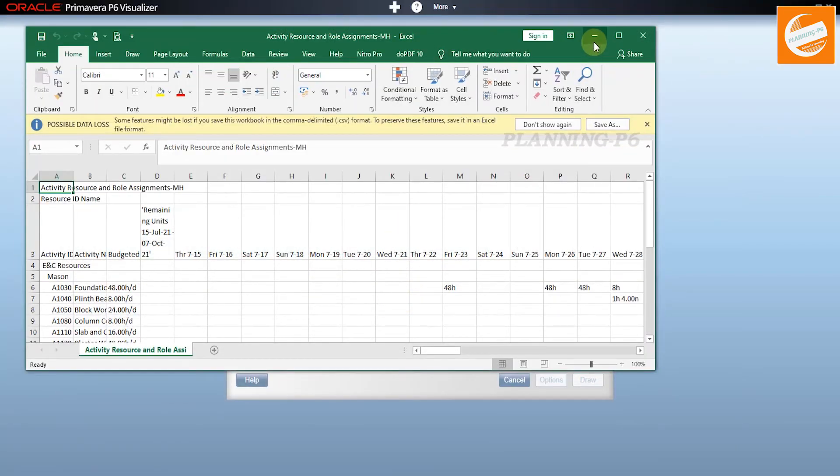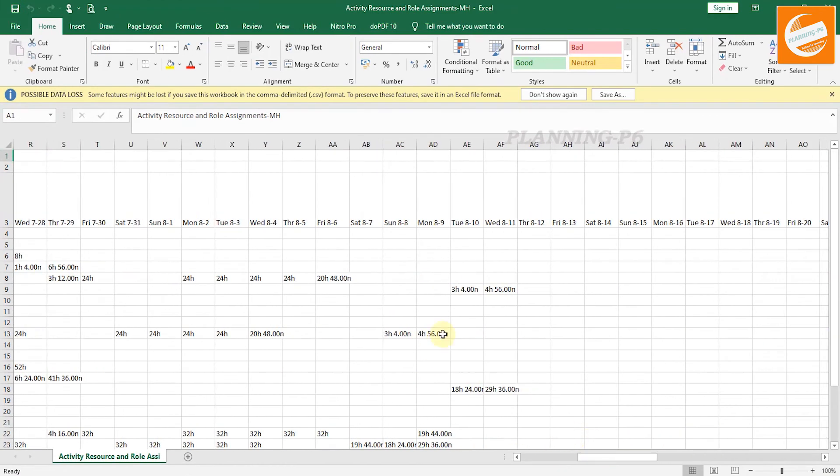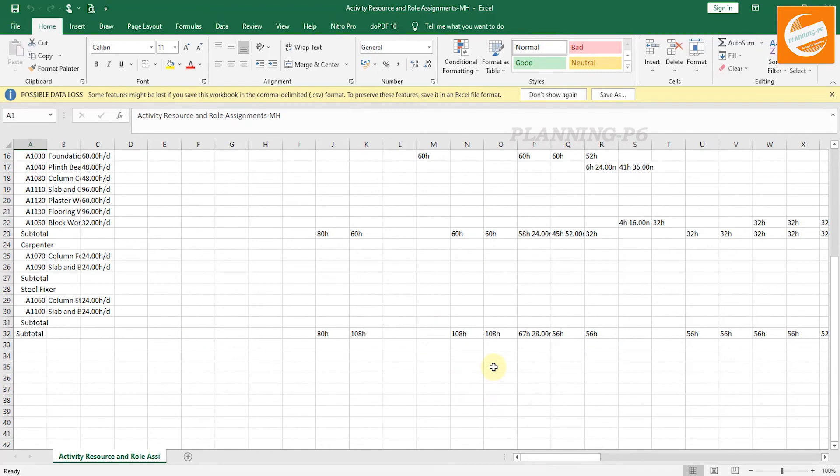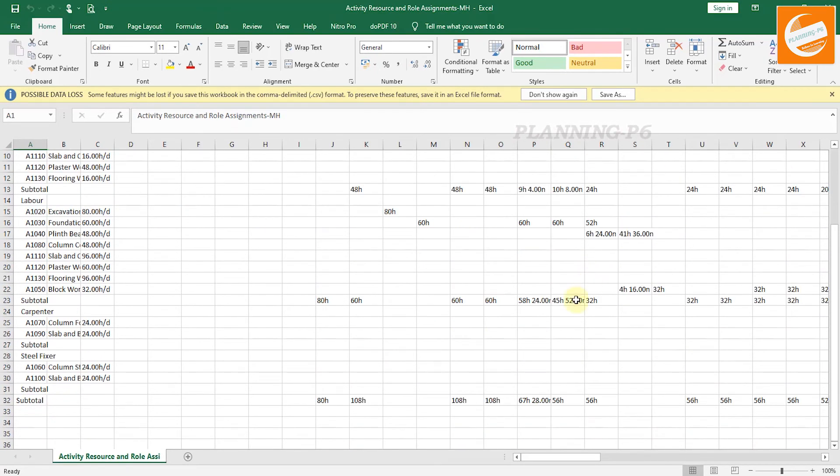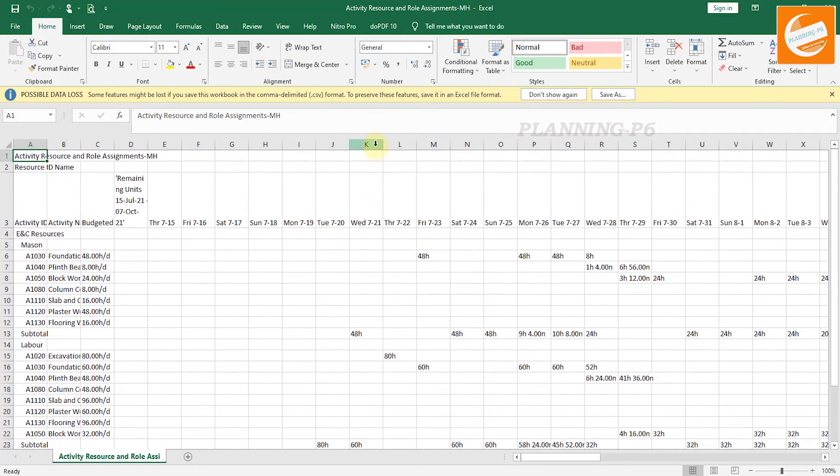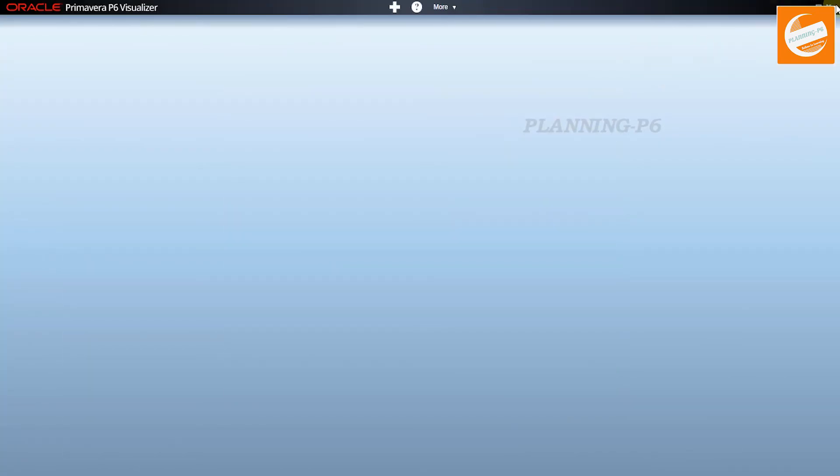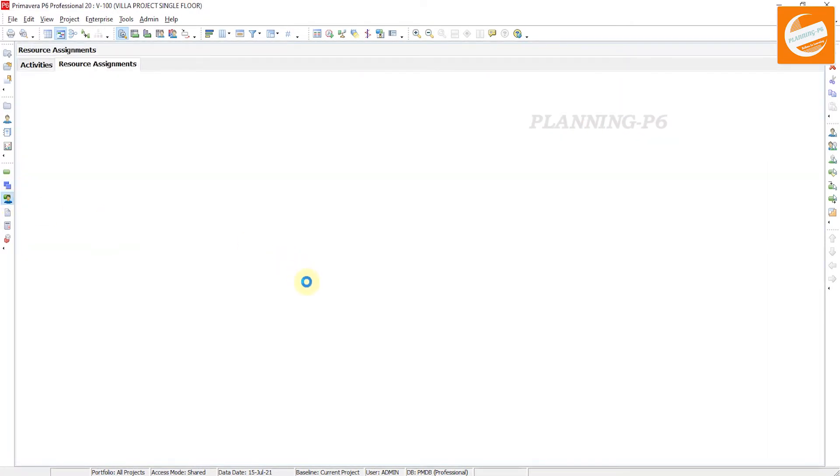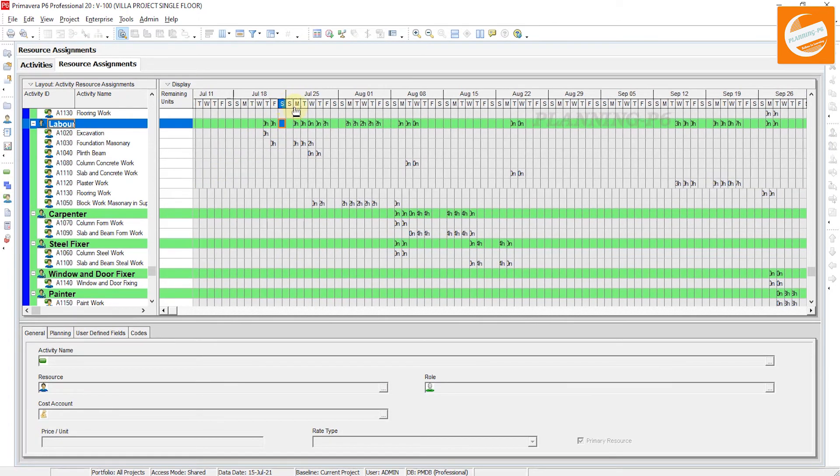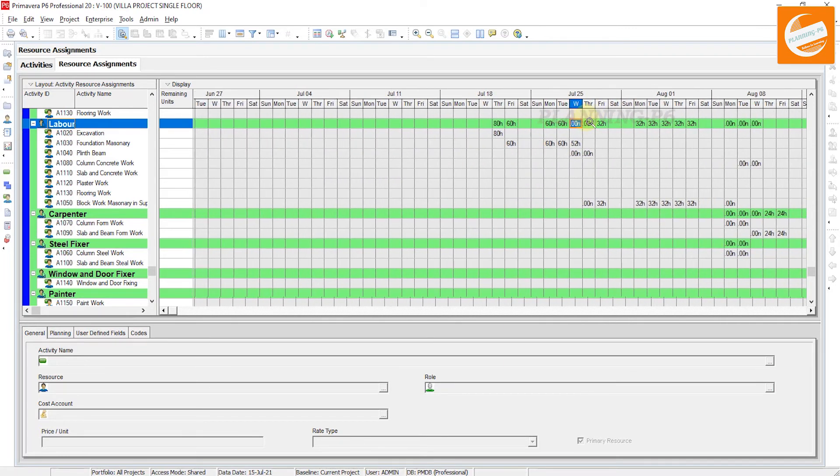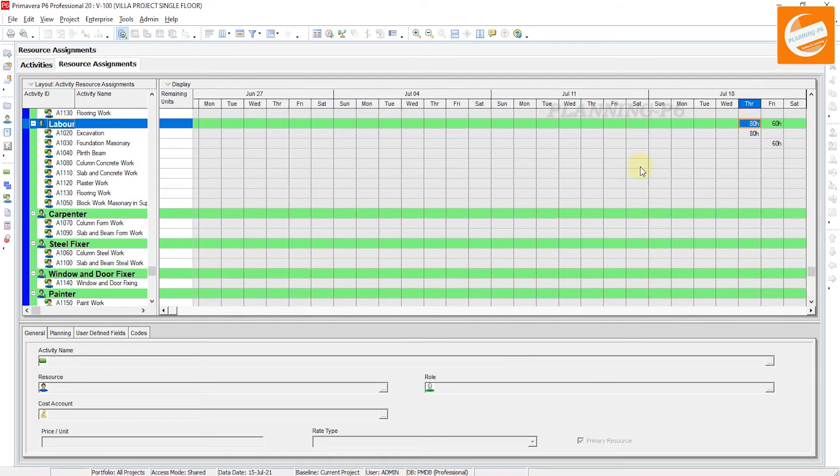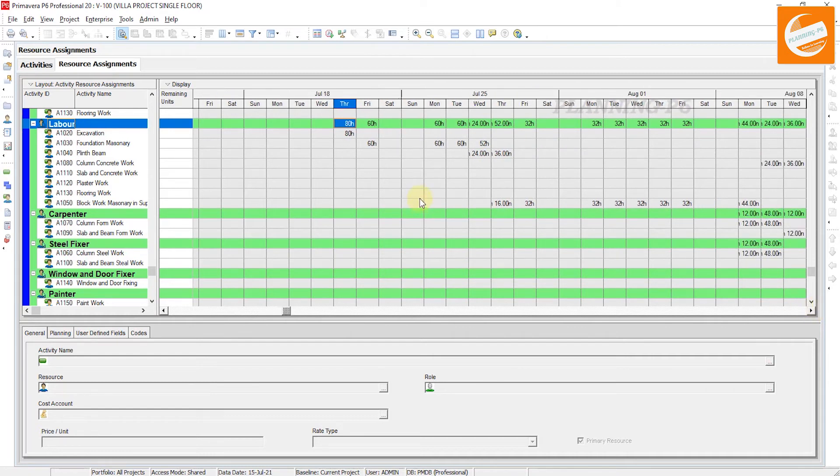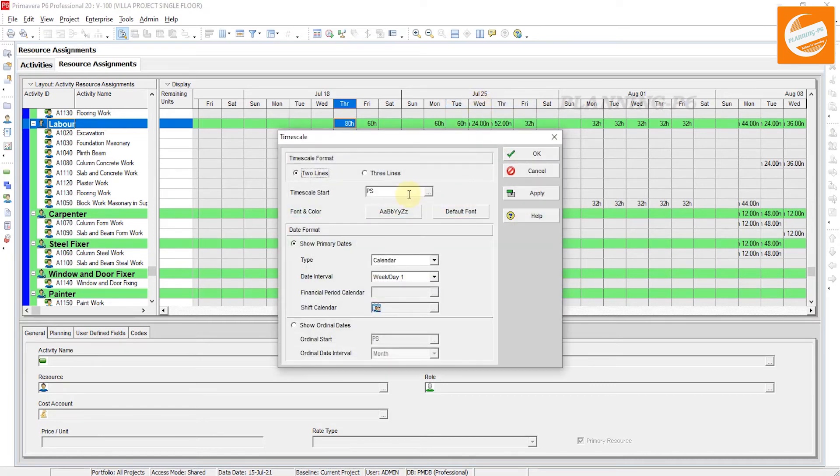This is for quantity, and this is for manhours. For the manhours, it will be shown here how many manhours are planned. We will create an S-curve with the help of manhours per day. The second option: open your Primavera, open your Resource Assignment. You can see here your Resource Assignment. First of all, your hours for the labor excavation - you can see on which day, which date your manhours are planned. You can set your time scale.